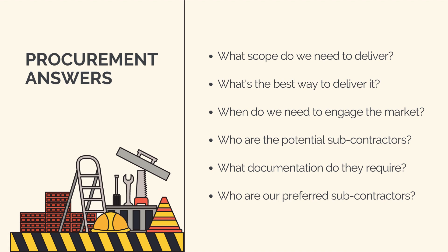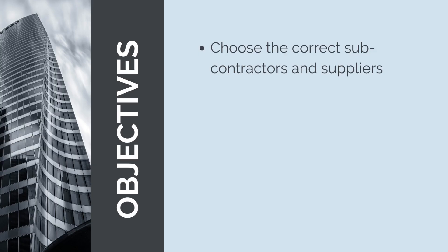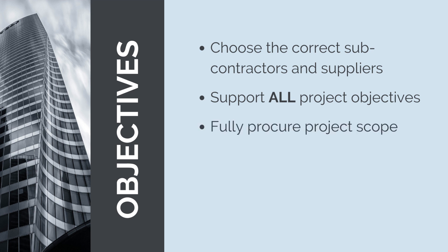If we've done procurement correctly, we will have chosen the subcontractors and suppliers best placed to help us achieve project success. This means supporting all the project objectives — we want to choose subcontractors and suppliers who can help us deliver the project ahead of schedule, under budget and to the required quality standards. Too often, we can fall into the trap of choosing subcontractors with the lowest costs, sacrificing other project outcomes. Furthermore, we want to fully procure the project scope, meaning there are no major scope gaps leading to expensive variations and unplanned changes during delivery. And finally, we want to conduct procurement in a disciplined fashion — through procurement we'll be signing legally binding agreements with subcontracts, so we need to make sure we're following the correct process to avoid legal disputes at a later date.